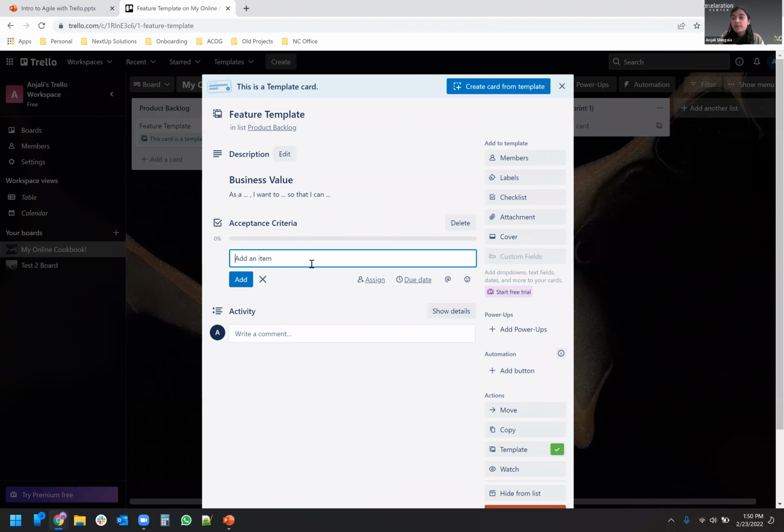checklist here. So then you have the ability to put, can a user log in successfully? Check. Yes, they can. Do they have a forgot password option? Yes, check. And the whole concept is these are yes or no things that can be easily gone through, check, check, check, so is this my definition of done? And part of it is with Scrum, you can develop what your definition of done is for your team.